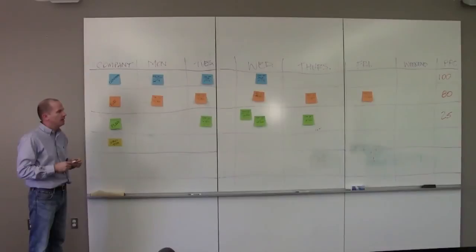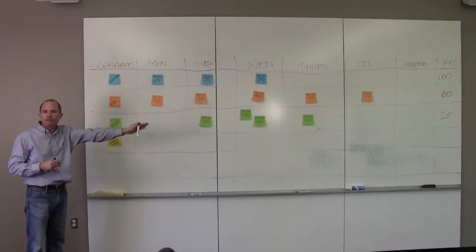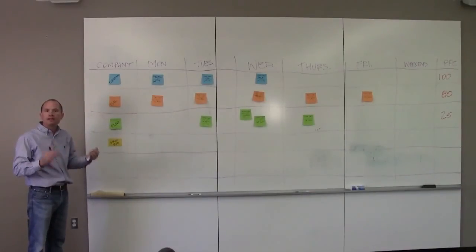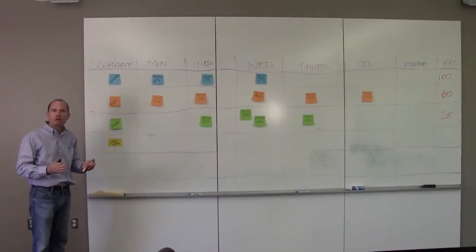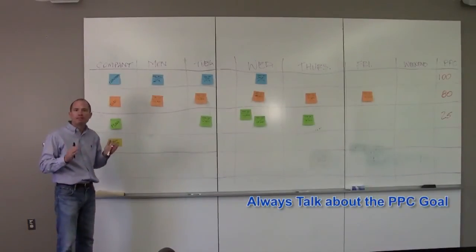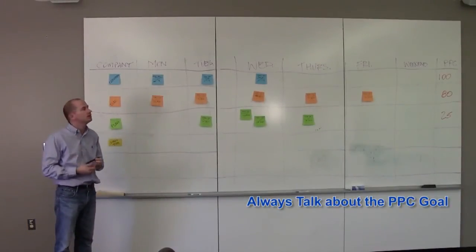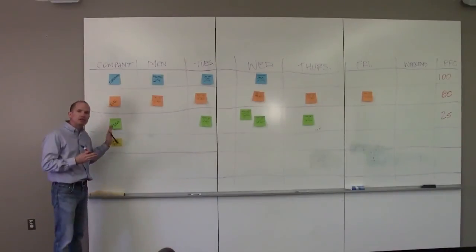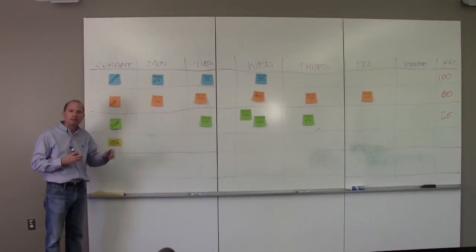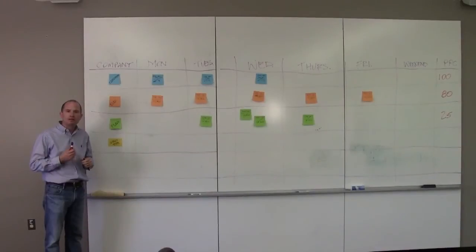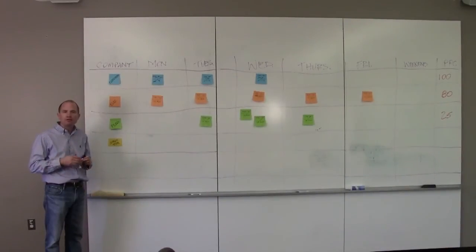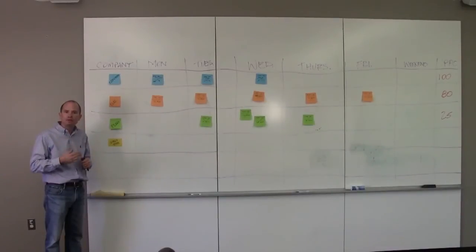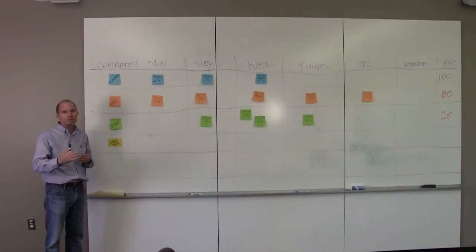So you've got a PPC there for the team. And you can create the average for the team. And I would display the goal. Always talk about the goal for the entire team of what the PPC is going to be for the project. Many times when you start this and you start tracking your PPC, you will find that 50% of all tasks are completed on time. So it's remarkable if you move up to 60% and 70% how much smoother a job goes. And that's not even close to 100%.